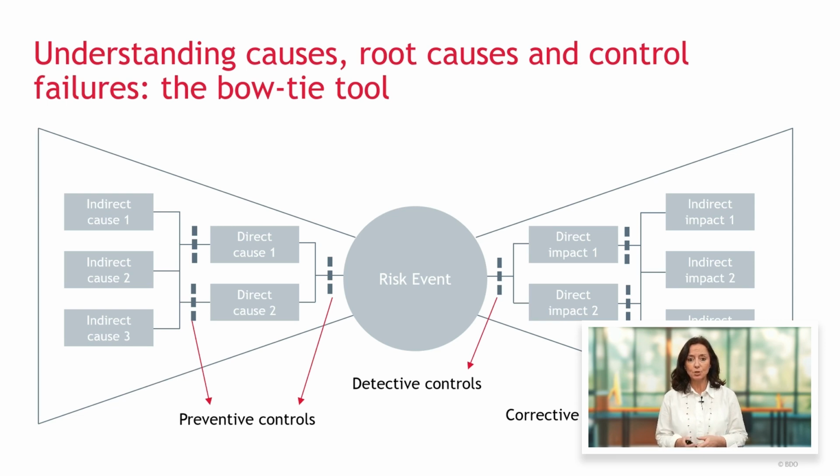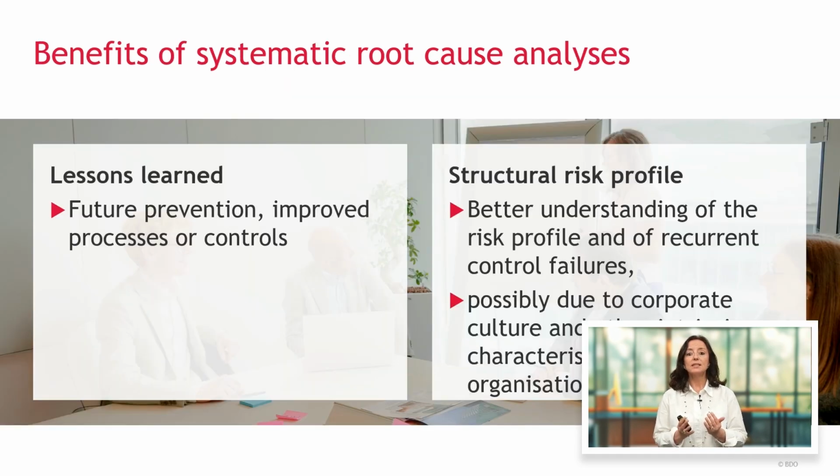So from a simple graphical tool like that, you can squeeze out a lot of information, and that requires usually the collaborations of all the parties that are involved or know about this incident. Now, the obvious benefit of using a bow tie analysis are the lessons learned, are the deep analysis of these large incidents. And if you have followed us since the beginning, and if you've watched the video on incident reporting, you know that these large operational incidents or large near misses that occur in firms deserve a bow tie analysis to really highlight all the lessons learned needed from that incident.